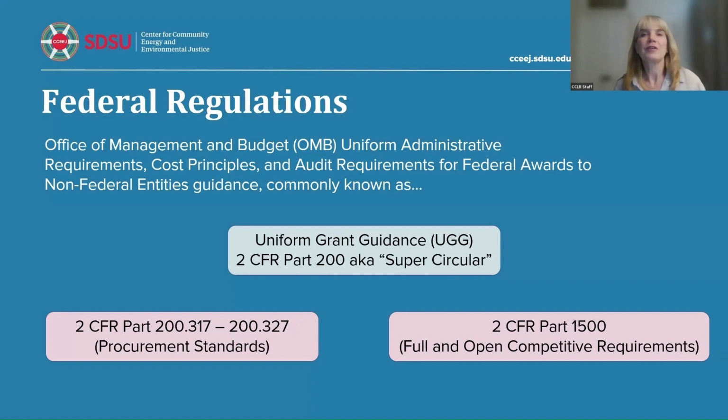So if you borrow an RFP, let's just say you're doing your own request for proposals and you're going out for procurement and somebody's giving you a copy or you found one, and you see A-21, A-121, A-80, if you see an A, there's a very good chance that it is a very outdated RFP, because nobody uses those anymore and they're not valid anymore. Okay, so that's just a little tip.